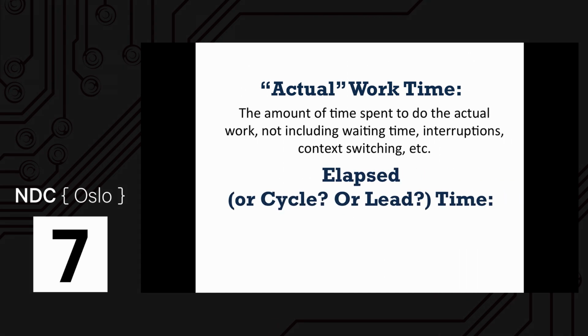So the other part of it, though, is elapsed time. So that's how much time. Sometimes we call this cycle time or lead time. I use elapsed. That's the time from when we first start the work till we're done with it. So in the case of the writing with the fountain pen, when we started is when we went out and got more requirements and said, what size of a card? Can it have lines on it? Is that a blue pen or is it blue ink or whatever? And then we go and buy the things that we need. Maybe we order them online and we get them. Now we do the actual work, which is what we thought they were asking us to estimate in the first place, and then we can deliver it. So that could take a while. Matter of fact, I've done this, like I said, this exercise several hundred times.